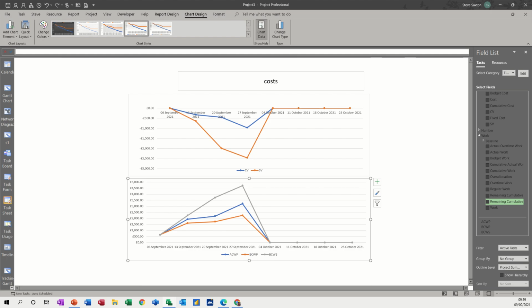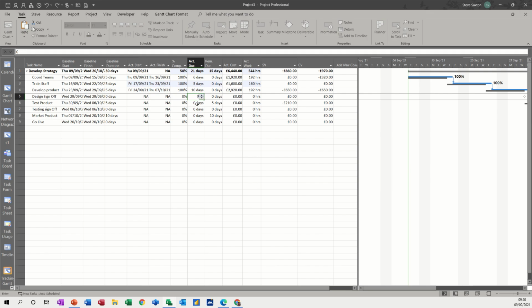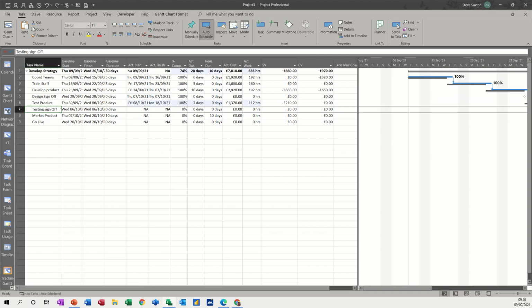So basically, if I go back to the tracking Gantt, as you're updating this project, let's say that was 5 days, actual duration is 0, that's just a milestone. Is that a milestone? Yeah. So just put that to 100% complete, and that should be 5 days. Let's say that was 7 days, and that's just a milestone, so we'll do 100% complete. Now this is the way I normally update these sort of projects. I don't just type in 100% unless it's a milestone.